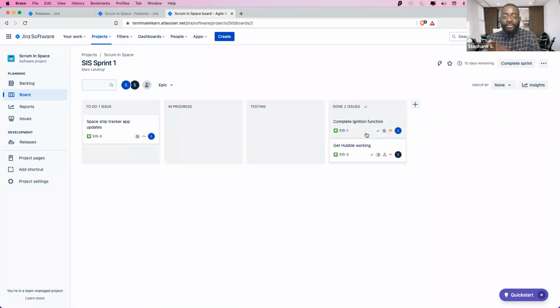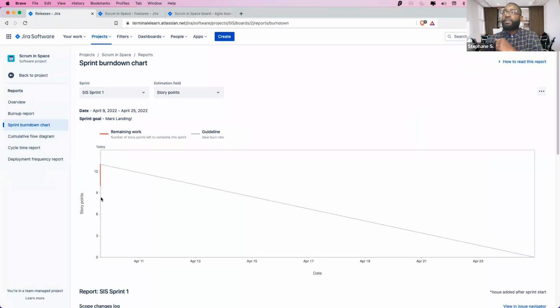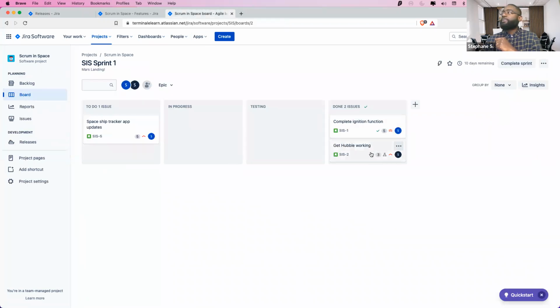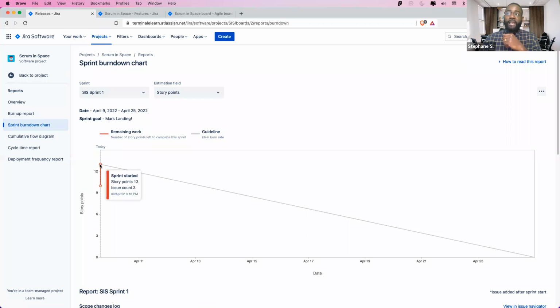So what is your outstanding story points remaining? 5. So if I go back to generating the board, now you are at 10. It's going to drop another 3. Right? How many did we drop? It's going to drop 5. We drop 5. So we drop 3 and then 5. So now you're going to have 5 left. You have 8 that you burned. So initially you had 13.